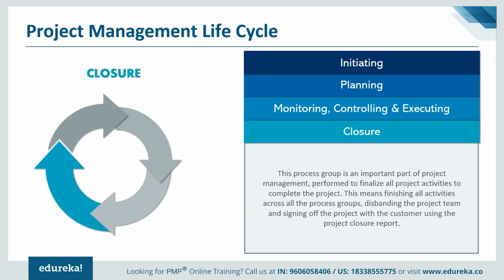A few key activities we do in closure are basically releasing the resources. When you start your project, you may take resources from various teams inside your office or maybe from a few outside vendors. So when we come to closure, we also release the resources. And before release, we want to make sure that any lessons learned which are not documented so far, we document. We archive these documents, ensure the payments are scheduled and the formal sign-offs have happened with the clients and vendors. That is what is done towards the closure. And finally, we might release a project report as well.